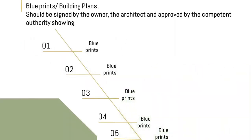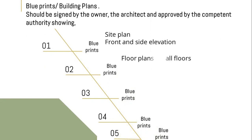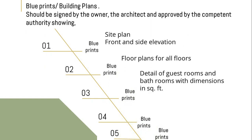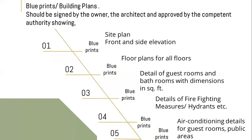Let's begin with part two of the HRACC information. Blueprints or building plans are to be signed by the owner and the architect and must be approved by the competent authority, which needs to show the site plan, front and side elevation, floor plans of all floors, details of guest rooms and bathrooms with dimensions and square feet, details of firefighting measures and hydrant, and air conditioning details for guest rooms and public areas.